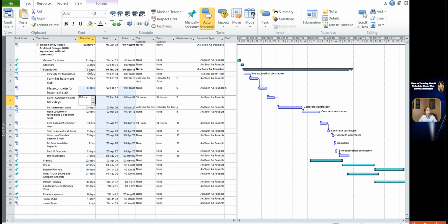If you change the task duration in the field, Project also assumes you want a planned duration, and also removes the question mark in the duration. Do not change the start date in the start field and the finish field.